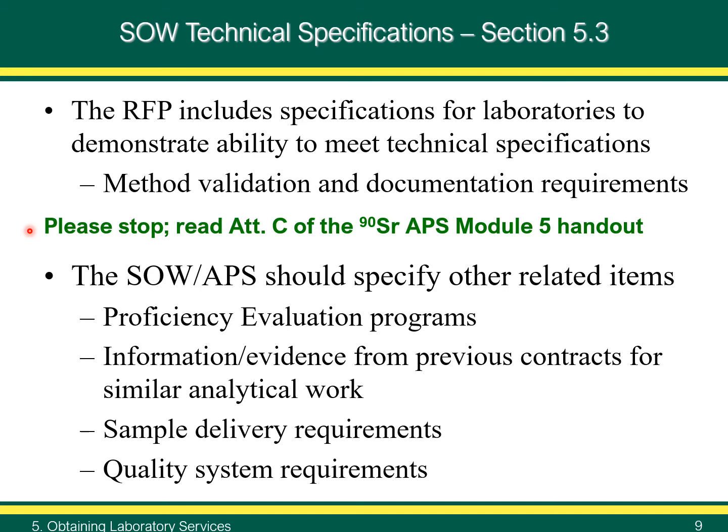In looking at attachment C, you'll see that if the laboratory has previously validated the method for a required analyte matrix and activity level, method validation level A would require no additional validation. If the laboratory has a method in place for a similar matrix, level B would apply, and 3 replicates are required at each of 3 test levels.